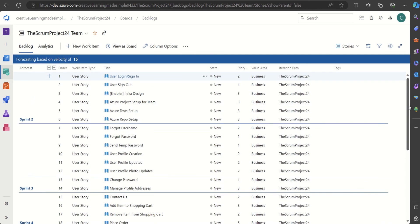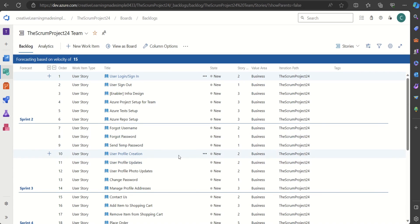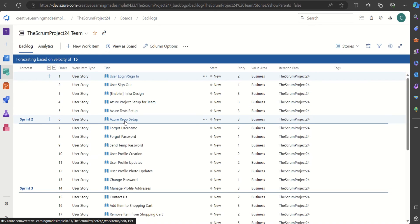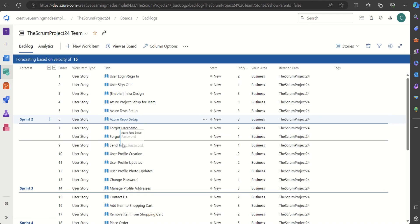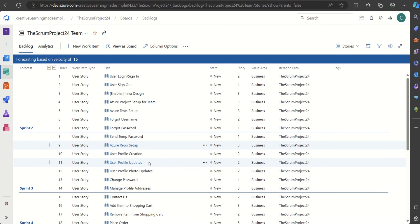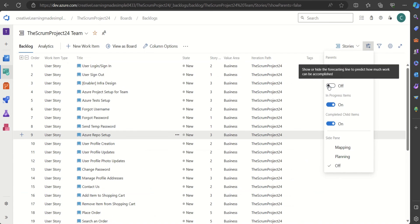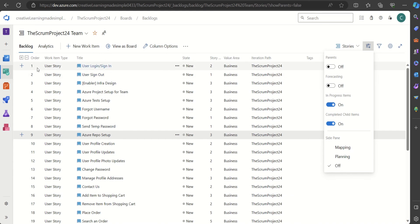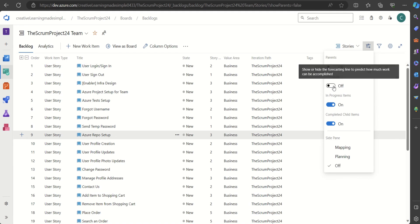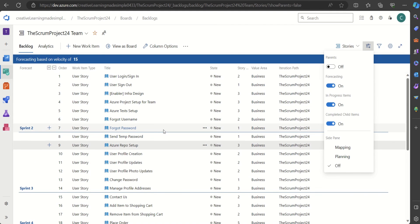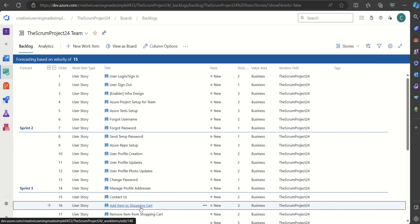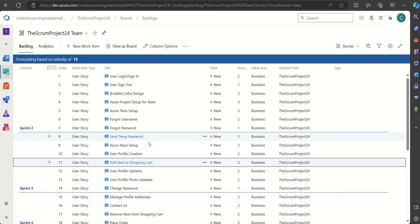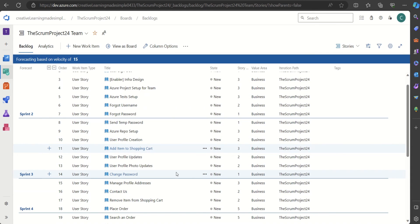Another important thing is the ordering. It identifies which user stories to complete in Sprint 2 and Sprint 3, but what about the ordering? Let's say we cannot do 'Repo Setup' in Sprint 2 — we can always drag it and place it elsewhere and it will adjust. If we turn forecasting off, we can see the order defined. We can drag and drop; for example, placing 'Add Item to Shopping Cart' in Sprint 3 will reshuffle some items accordingly.